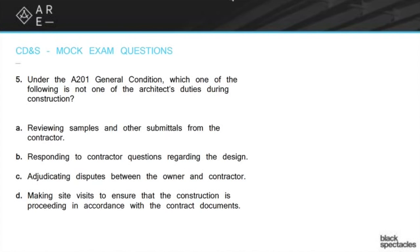The other problem is the phrase 'in accordance with the contract documents.' Think about it — if you're 30% of the way through the project, does it say somewhere in the contract documents what it should look like at 30%? No, it doesn't. So you can't say you're ensuring it's in accordance with the contract documents because there's nothing to judge it against.